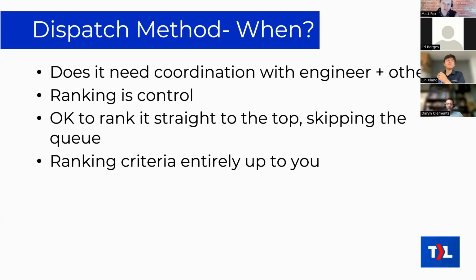Instead, in the Kanban board, this ticket is going to get ranked in a list of existing tickets, and that determines its priority and when it gets done. So we can't answer exactly what time of day it's going to get done. It's more in terms of it's going to get done when it gets to the top of the list based on its priority.